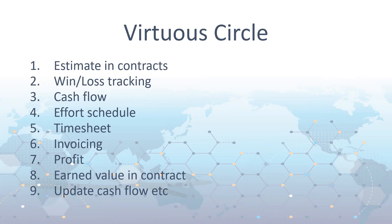We can compare actuals to the original budget in the contract and start to get an idea of profitability. Those timesheet hours also come into the new invoicing sub-nav and we can review those hours and work out what we can bill. Depending on the contract type — if it's milestone claiming, we can look at comments against the contract deliverable; if it's a schedule of rates, we can base it off time spent. It's all integrated into one screen.